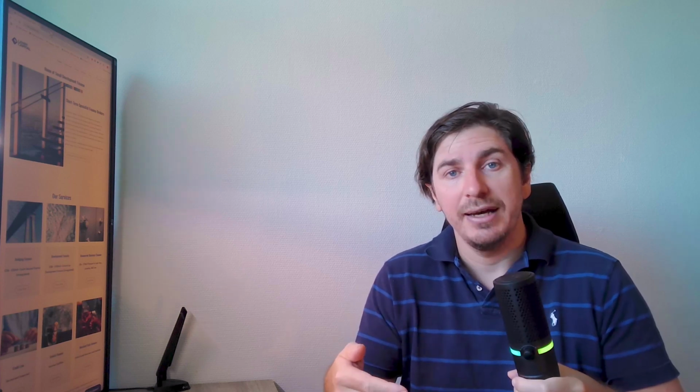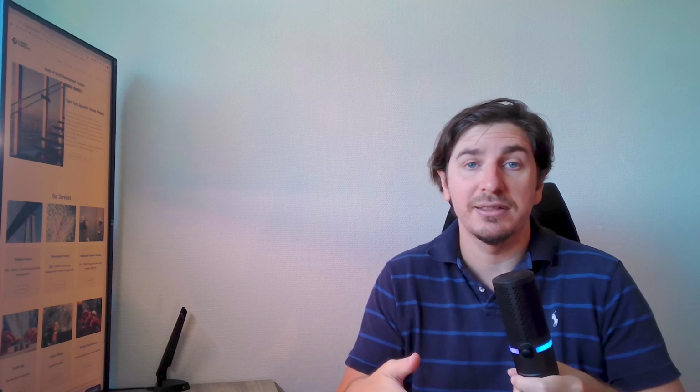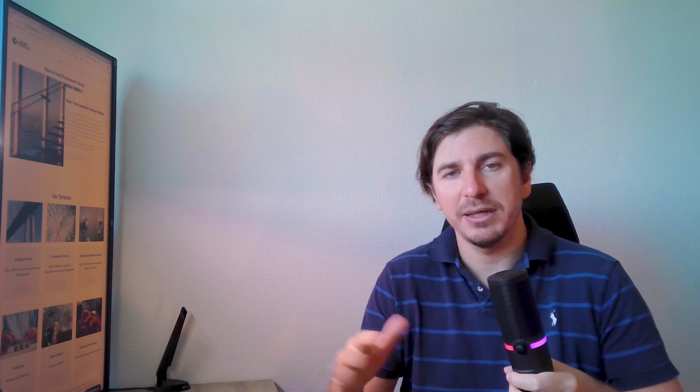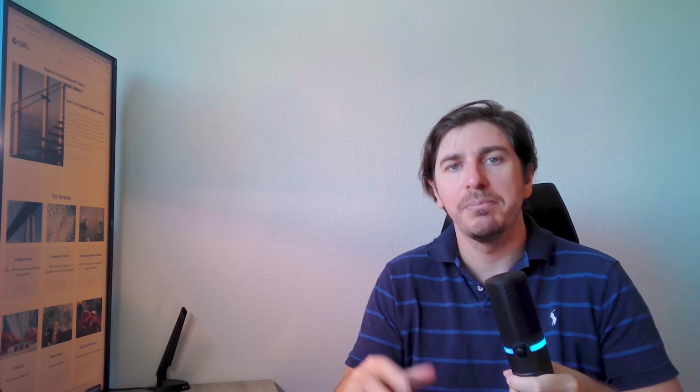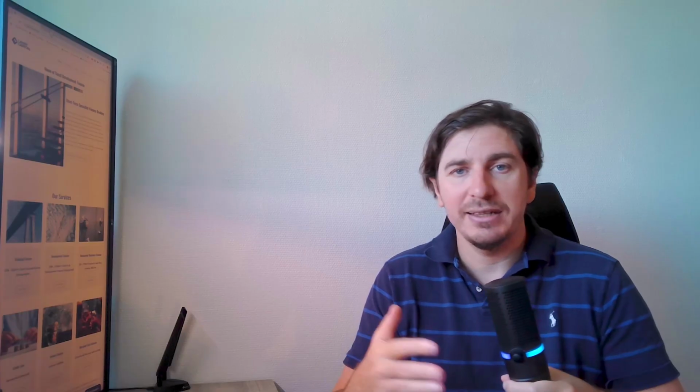Then there's the exit strategy costs. These are the costs in selling the actual project off or refinancing it onto a buy-to-let. If you're refinancing, you'll need another valuation, solicitor fees. If you're going onto a buy-to-let, they're often taken care of within that, but it's something to bear in mind. And the marketing costs if you're doing this yourself or if you're using an agent. And then the big one, obviously, is the tax. This is a huge one. You've got your VAT, your capital gains tax, and with any tax advice, I would always speak to a qualified accountant before you start any project.